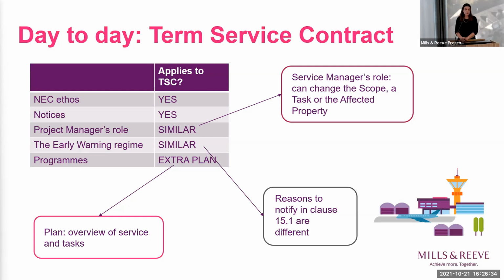And then on programmes, there's a slightly lighter version of this for the overview of the tasks, which is called a plan. And then the programmes apply to tasks. So just to explain on tasks, the term service contract envisages that tasks will be called off against it as the contract term progresses. So each individual job will have its own internal programme, which contains or should contain identical issues to the ones that are required for the ECC.